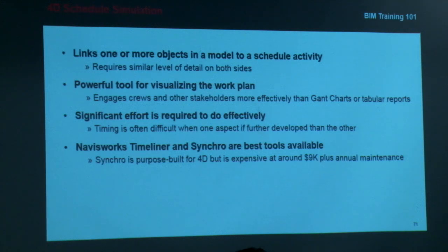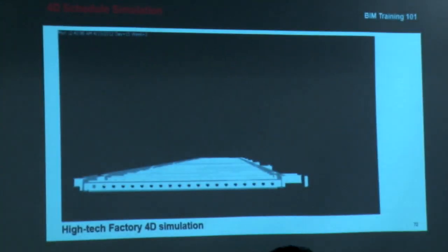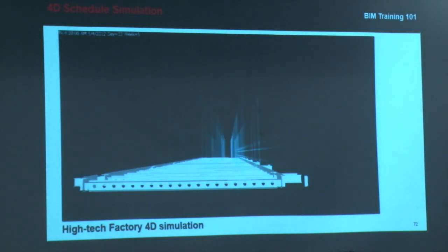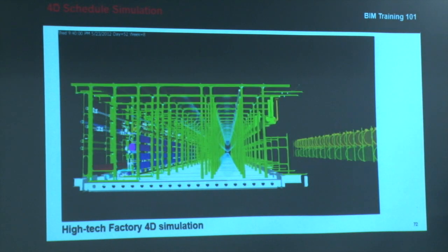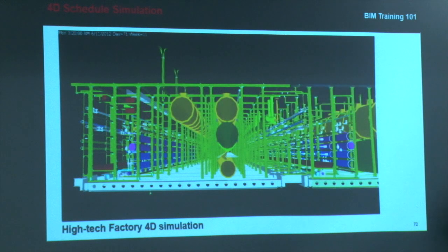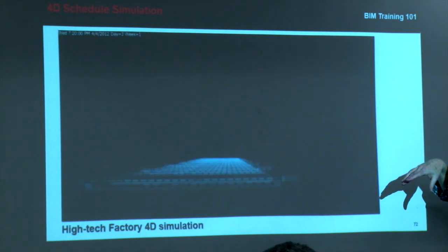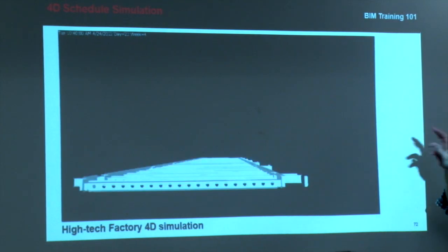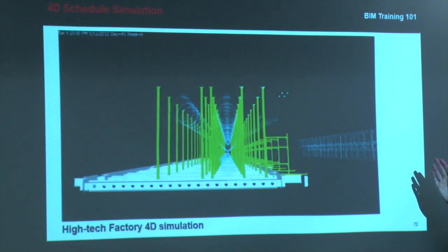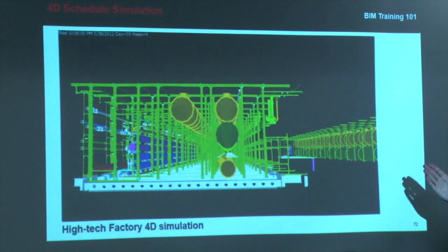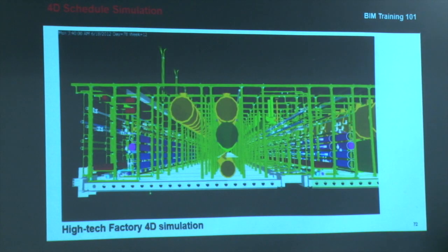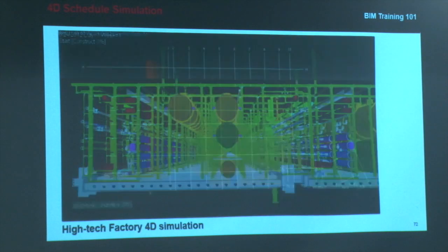So one thing I wanted to show you, we talked a little bit about the 4D, which is tying a schedule to a model. I had a couple of videos that I wanted to show. This is a semiconductor factory where we had to put these big racks in, and we figured out all the parts and pieces, got it all clash free, and then figured out our installation sequence, and we showed this to our bidders to show them what the sequence is.